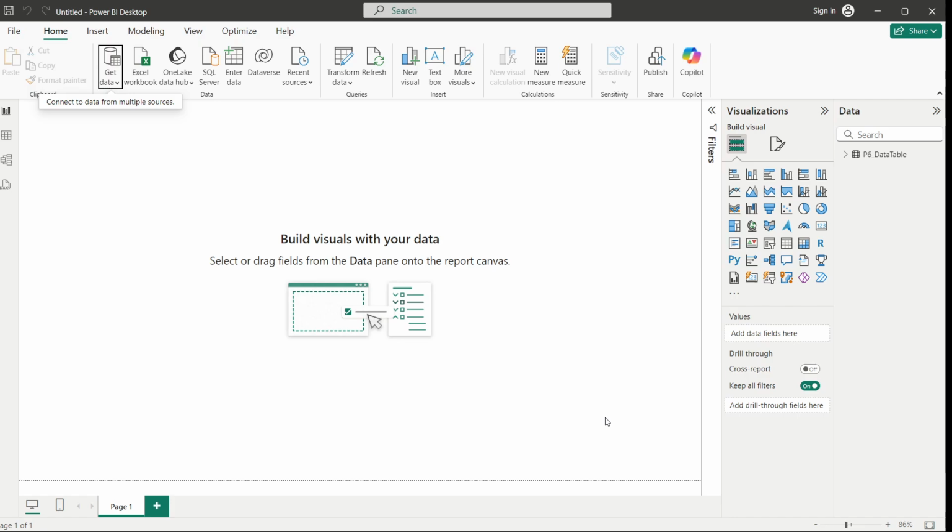So this constraint will be shown as asterisk. Once you click copy this data into Excel, it will not be shown. But when you open the date column filter, you find that some asterisk or the dates which are not considered as date will be marked separately. So you can go and modify the dates in the Excel sheet.